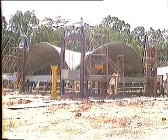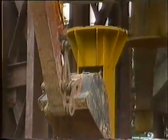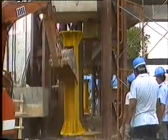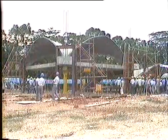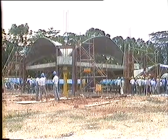When we have made the roof ascend 2.5 meters, we will insert the columns, and these will be secured with bolts and nuts. And the lifting jacks and the lifting towers will be dismantled.